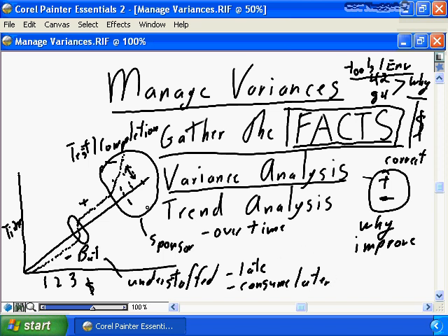Which is in fact exactly what our project did. At month 4 in our project, we have begun the additional consumption. We brought the additional materials, we brought the additional team members in, and now, although we are trending away from the budget line, the net, for the sake of simplicity, is 0. So upwards to this point in time, I know my graph is getting a little sloppy here, at month 7, we can probably say the project is absolutely on budget.